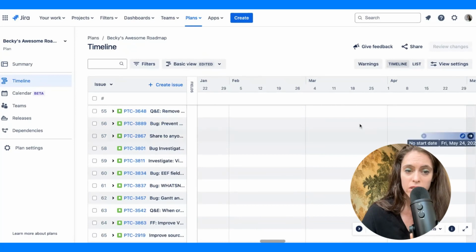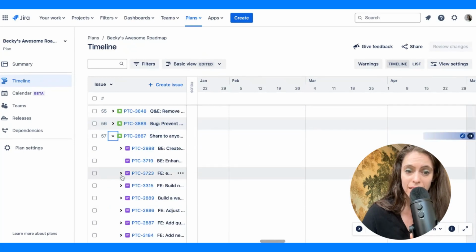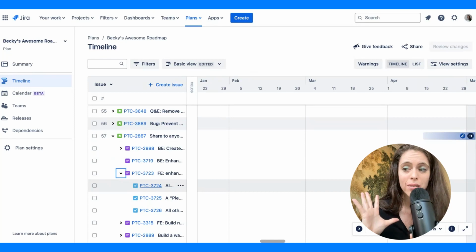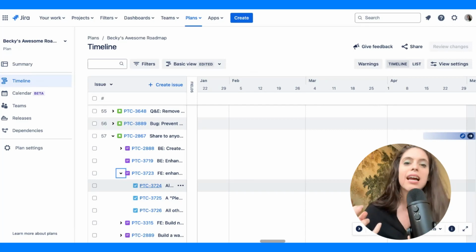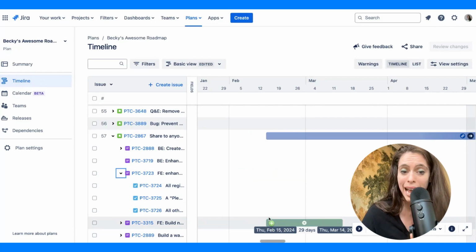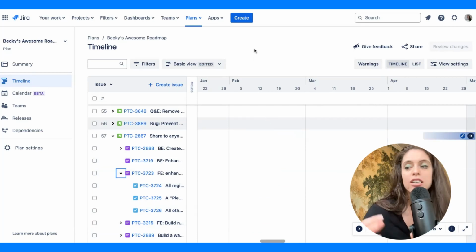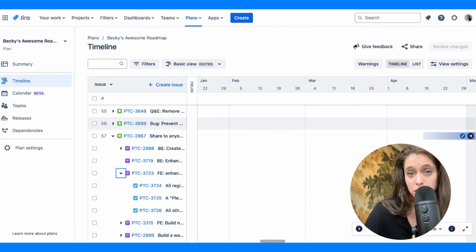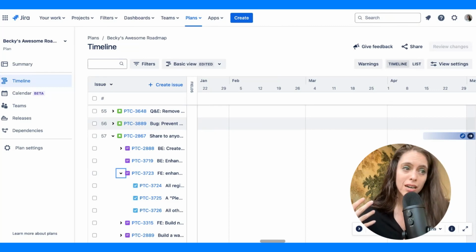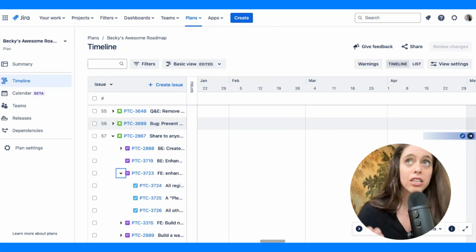And when I drill down, on top of seeing things at the task level, I can also see at the subtask level. So being able to pull in multiple Jira projects and being able to drill down are really the X factors for Advanced Roadmaps. I can also visualize critical paths, and I can share with other people who are also in Jira. Now, this option does not allow for milestones. And like I mentioned, you can't share with external stakeholders, people not using Jira.